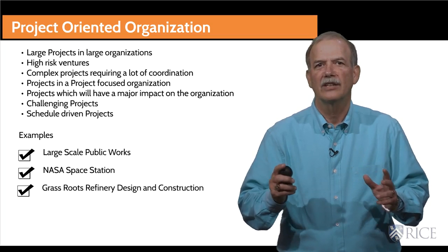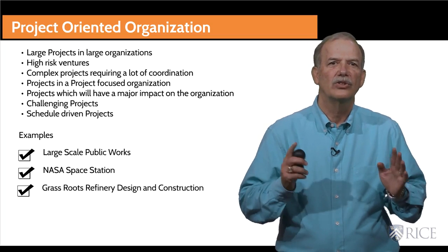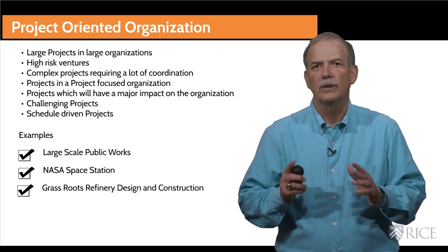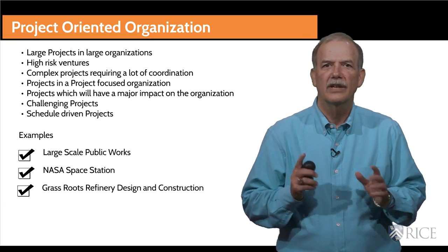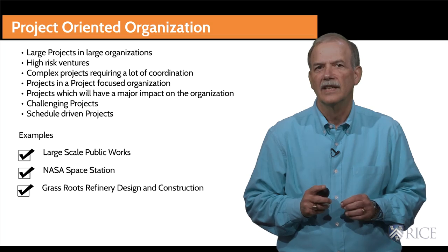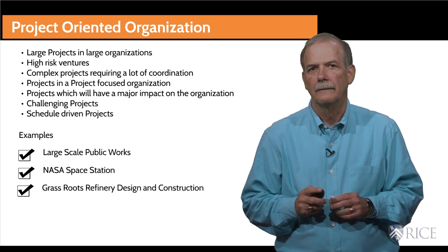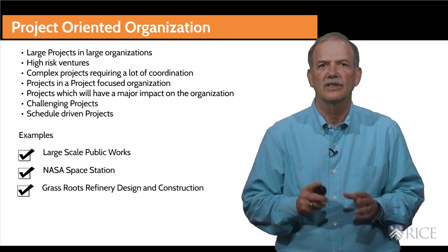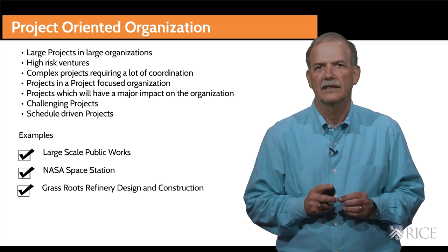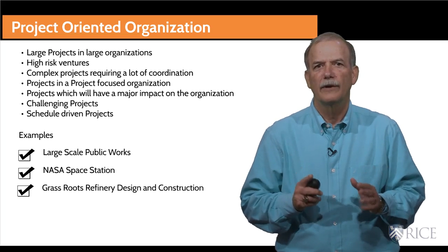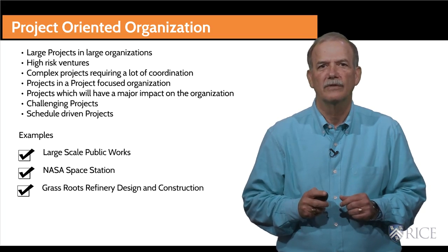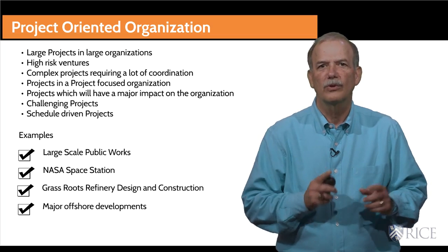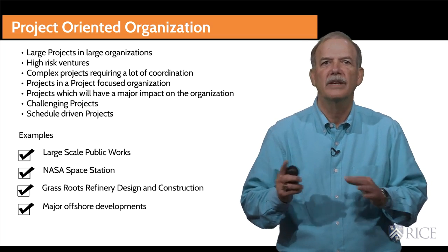Grassroots refinery design and construction. This is a large, new built facility with multiple interconnecting units. These projects are typically schedule and cost driven, with complex interfaces within the facility and with existing facilities. The logistics to design, purchase, and deliver material to support construction is highly complex. A highly focused and dedicated team can make all the difference. Similarly, major offshore developments fall into this category for many of the same reasons.